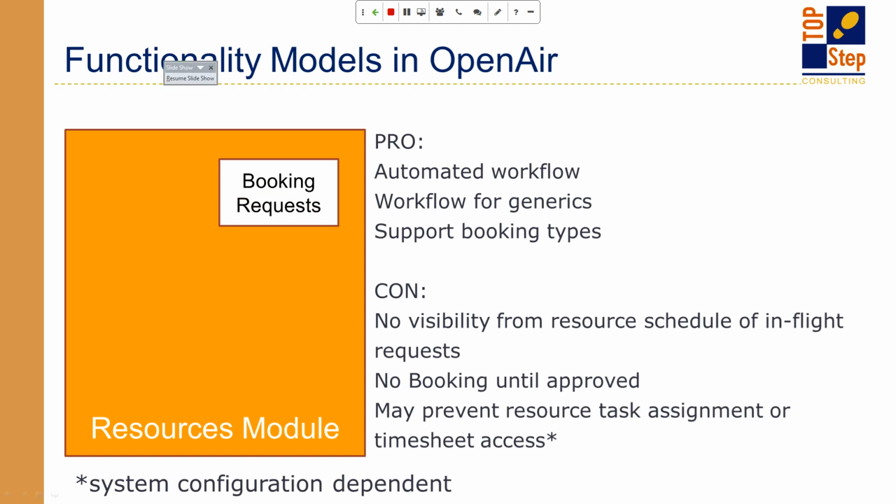Yeah, so pros and cons of booking requests. The obvious pro of this approach is that it does allow for that automated workflow. So it restricts the booking of named resources to a central authority who has visibility over the entire resource pool. Now, for the downsides.